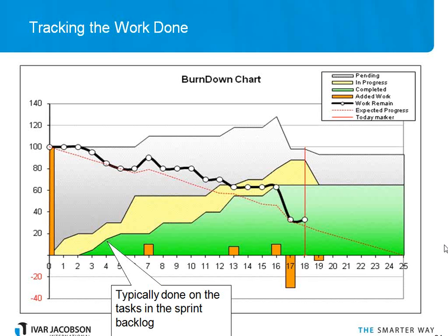On day 17, we removed some elements because it became apparent, probably during our daily stand-up, that we were not going to get all of that done in the remaining time. Some new things, possibly more important, have been added, so let's remove the least important ones.